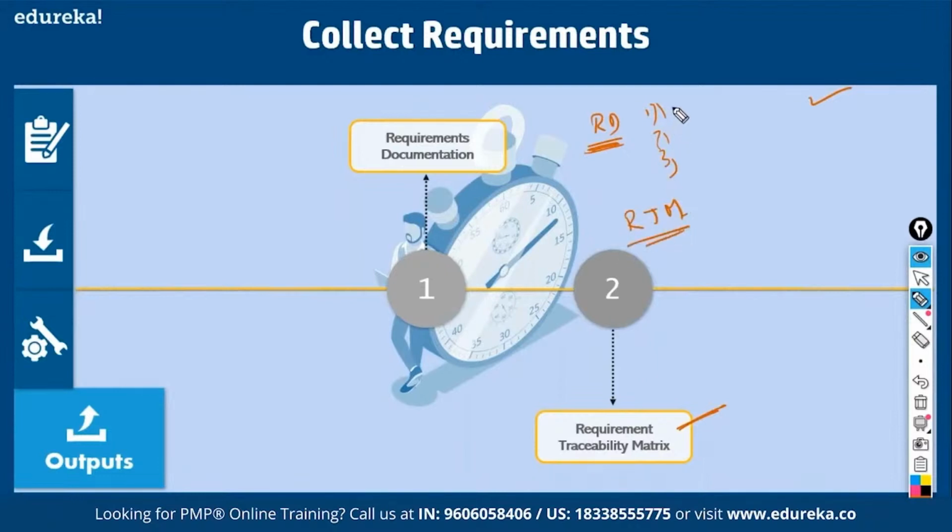So you have to map the requirements to the high level business need, that is, you want to be the market leader. Then you may have to map this to architecture drawings, then database procedures. Then for this particular prototype, you would have done a lot of tests, test cases, test scenarios, test conditions, test results. So you have to map it through all these, and only then you can sign off. That is called a requirement traceability matrix. So when you collect requirements, you also stipulate the template in which you'll be demonstrating compliance with requirements to the stakeholders later on, so that you'll get a formal acceptance.